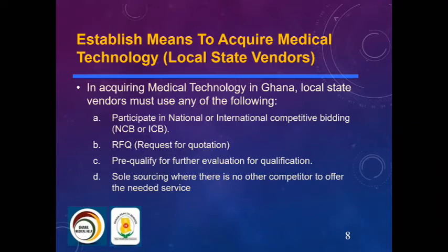However, we have another RFQ, which is request for qualification. It is not in this slide, but I need to emphasize it. Request for qualification is usually used for works, where in most cases you don't know exactly what to do. You don't have the information.